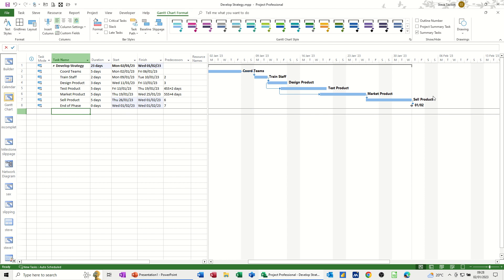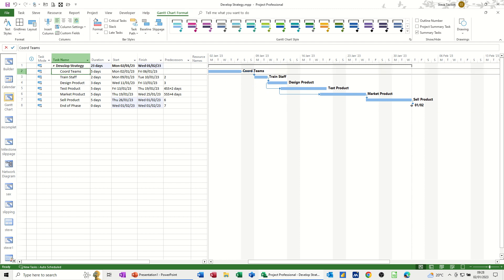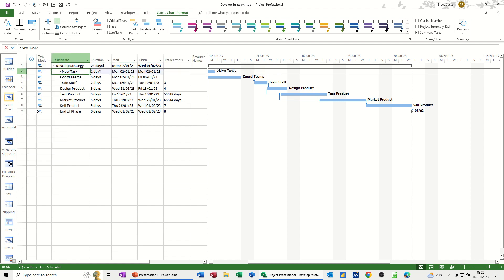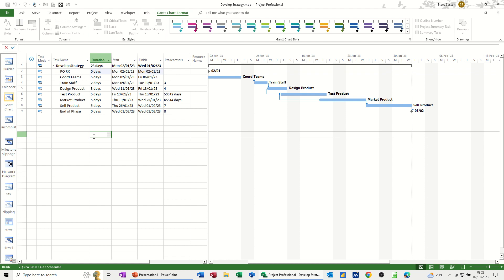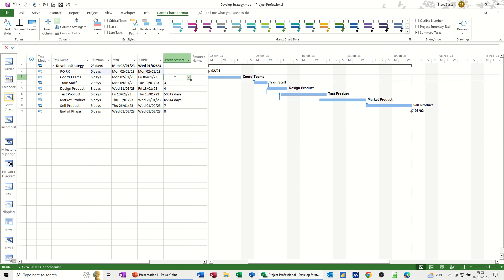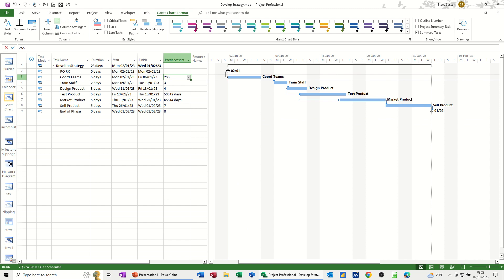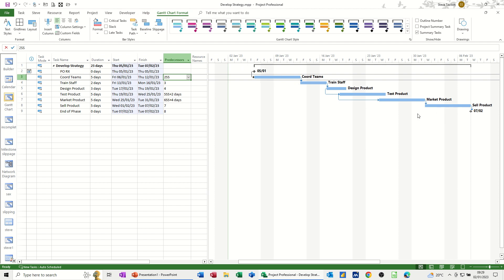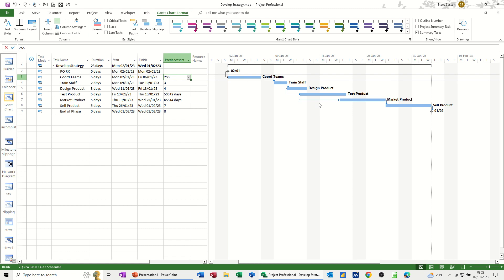So that's now how we want our little project to look. We've got the durations and what triggers this whole project. I'm going to insert a task at the top — let's say you need a purchase order to trigger this project, so I'll call it 'PO Received'. Right-click on row 2, insert task, PO Received — a milestone with zero duration. This first task is going to be SS on that, so I'll go to SS. Getting the PO is what drives the whole project, so if that PO is delayed everything will be delayed.